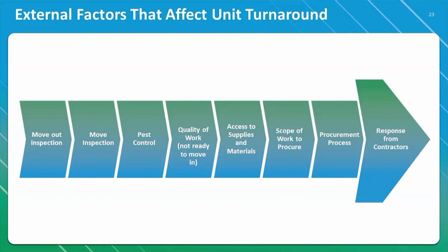So have those vendor outreach discussions, have those training sessions. It goes a long way and will improve the conversation and potentially bring you more quotes. And sometimes it's just the procurement handbook that you're using that makes it a little bit harder. You could potentially go to quotes instead of having an RFP or a closed bid. So you just need to look at those kinds of factors. Next slide, please.